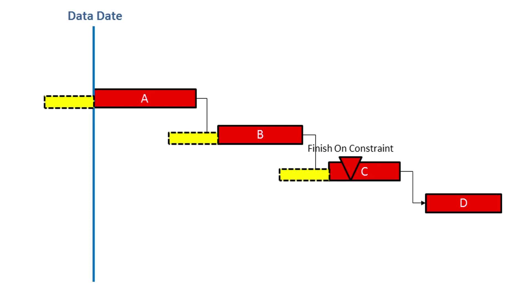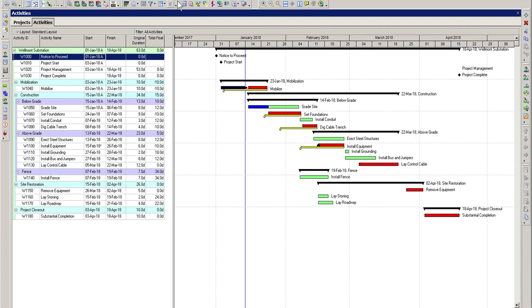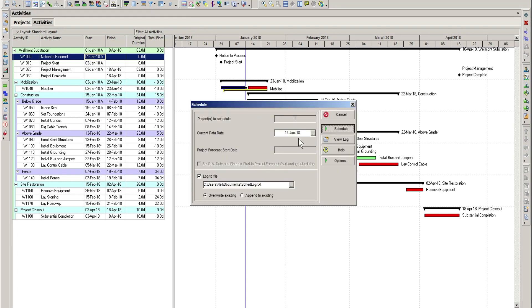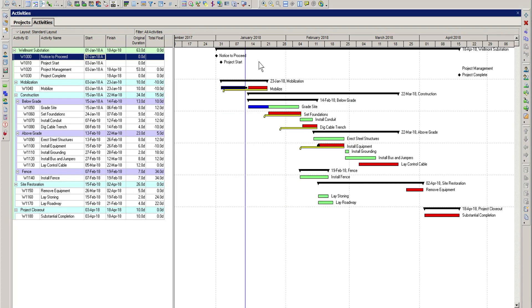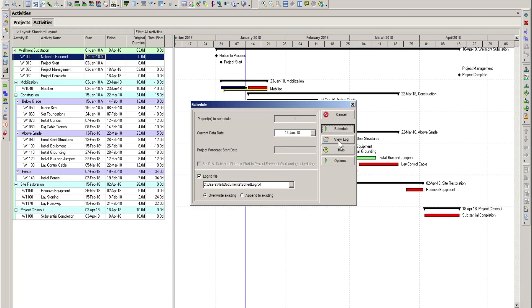Because negative float is typically caused by the schedule exceeding a constraint, this type of invalid date tells you that a key date is going to be missed. The Primavera P6 schedule log doesn't specifically call this condition an invalid date.